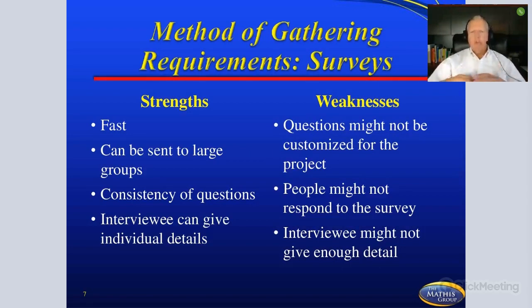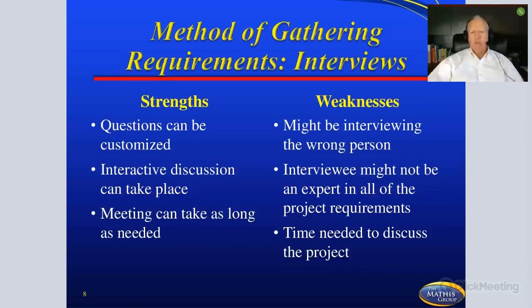We've all sat there and we all know how it kind of evolves. We want this, but then as we start hearing other things, we think, oh, well, it needs that as well. So we get caught into those things. So a survey is a great tool to get it into the pipeline, but if the project has any substance, it's probably not the best tool to really get the scope of work. And so you're going to want to watch that. Now, in your circumstance, it might be different, but in most cases, that's the case.